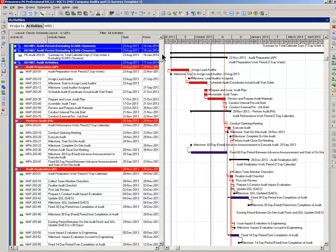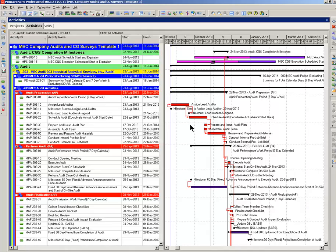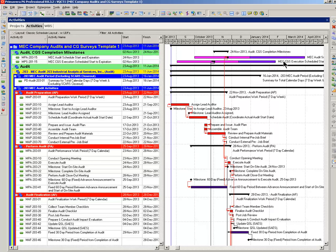Now, the milestones that you see here and here, these are just normal milestones signifying the beginning of the actual field audit. And they will be driven by the schedule itself. So, as these milestones would move within the pink bar, everything's still good. They can move to the purple bar, it would still be acceptable. If they move out into here, then things are late. So, that's the lesson of the day. I hope that you can find this useful. Thanks. All right.